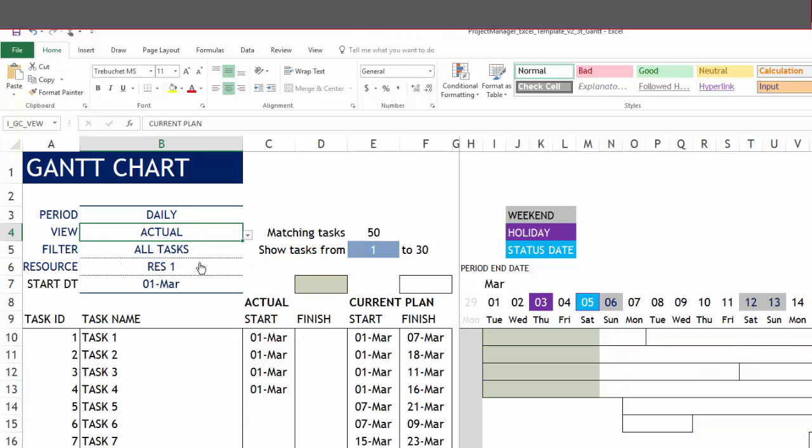We also have actual. So this is the actual work performed, shown in light green. The entire current plan is shown in white. This shows you the actual completed work with respect to the overall current plan.